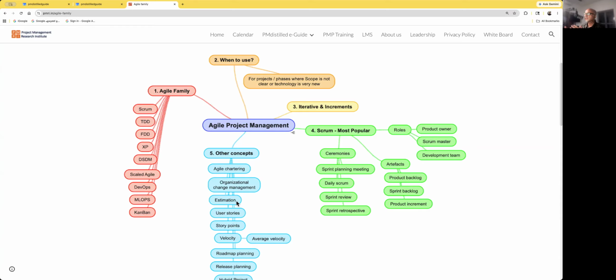We get accurate estimates when the engineers provide an estimate after working on it for some time. But at the same time, we will not be able to start work without some kind of estimation. So in Agile, we estimate using the Fibonacci series or t-shirt sizing, which I'll explain as we proceed.